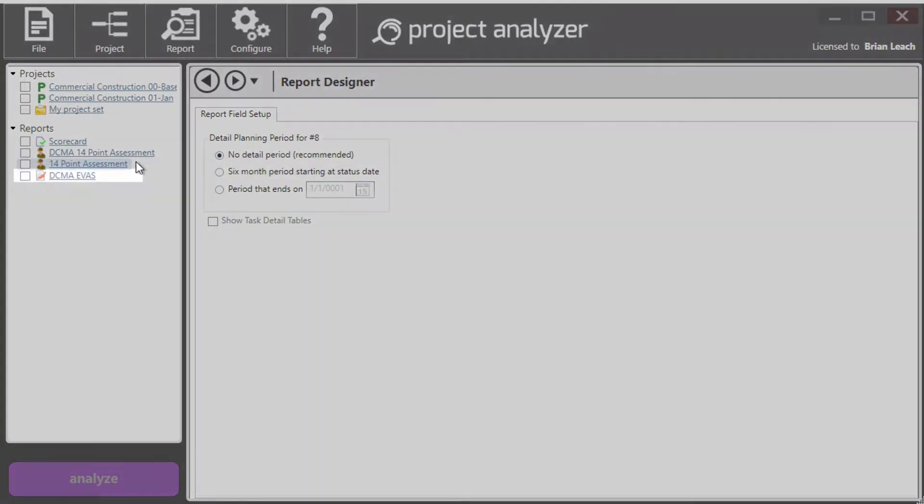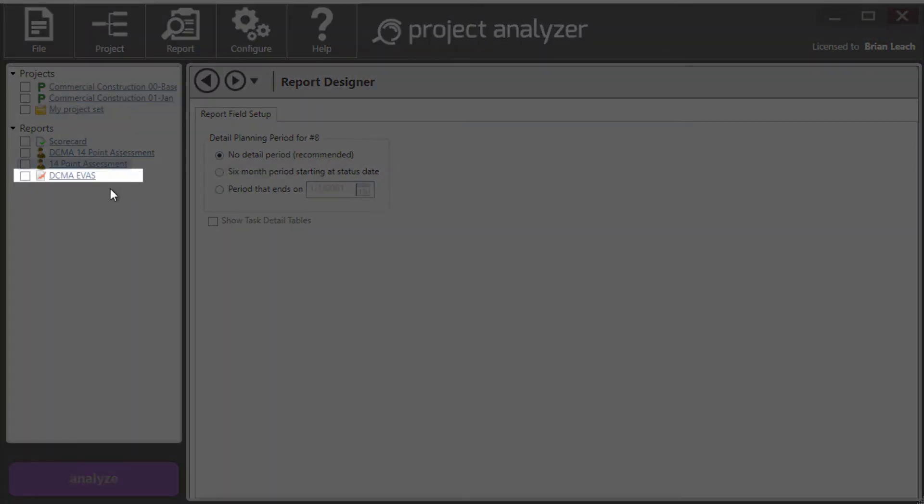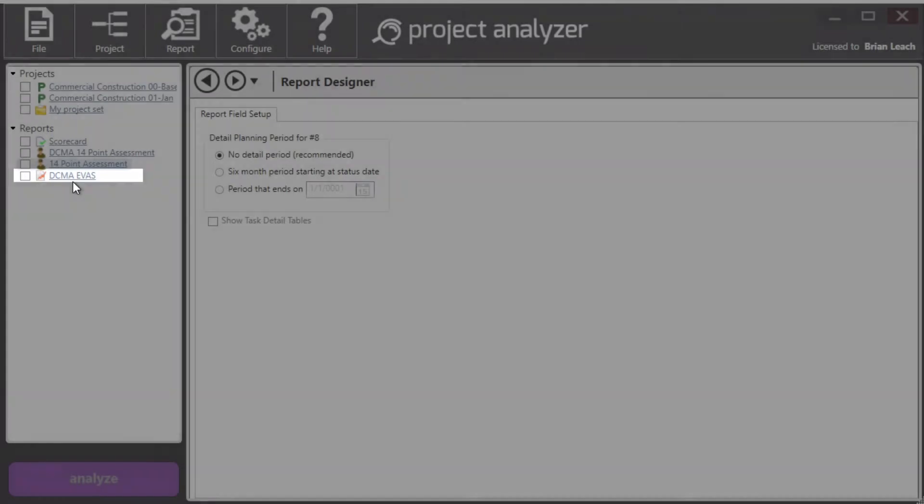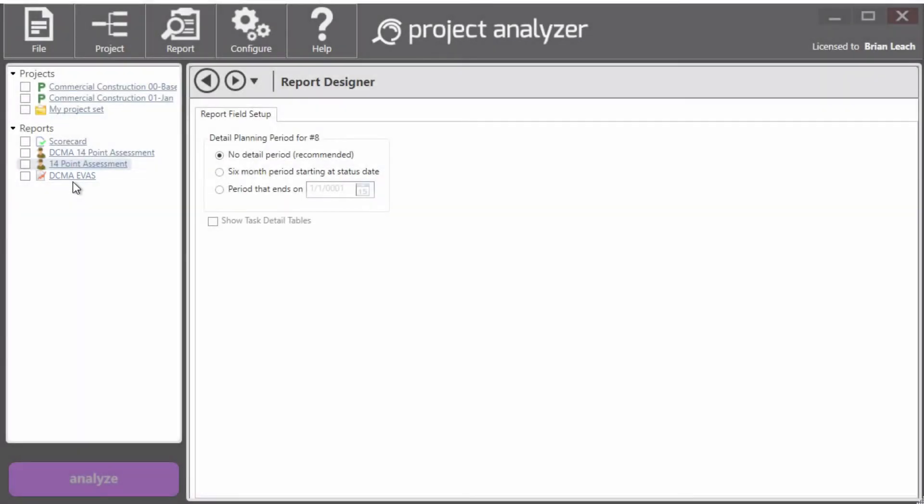And the third one is DCMA EVAS. And that is the newer next generation set of checks. The spec, which this is based off of, covers both cost and schedule. We in analyzer only look at the schedule part of those checks.